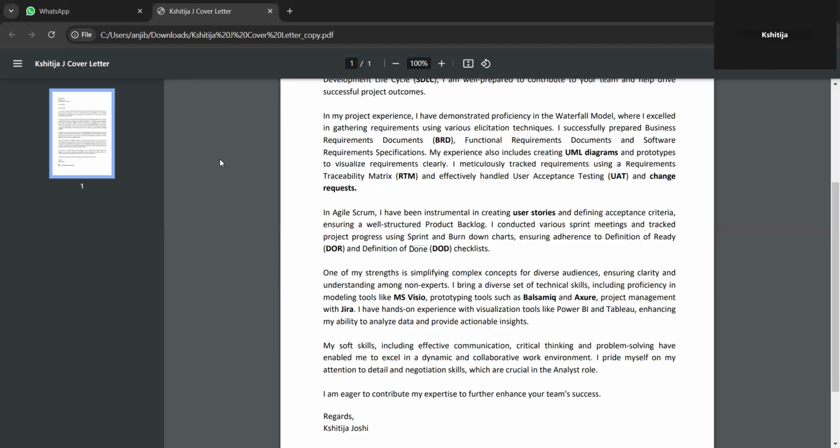After the bug fixing, there is a final review meeting with the stakeholders to discuss the UAT results. After the bug fixing and detailed discussion, I obtained the formal sign off on the UAT, through a client project acceptance form.